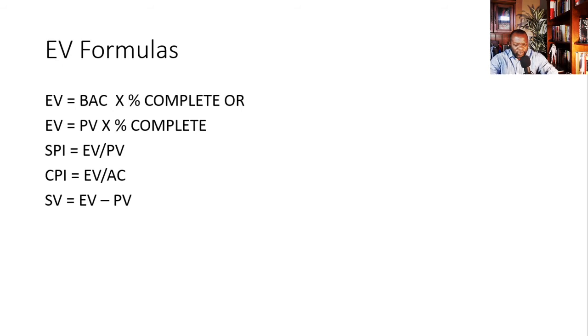Here is your drill for cost variance. Cost variance is equal to, go. 3, 2, 1. Cost variance is equal to earned value minus actual cost. Type in the formula for variance at completion. Go. 5, 4, 1. The answer is BAC minus EAC. It starts with B followed by E. Just remember that. B comes before E in the alphabet. BAC minus EAC.